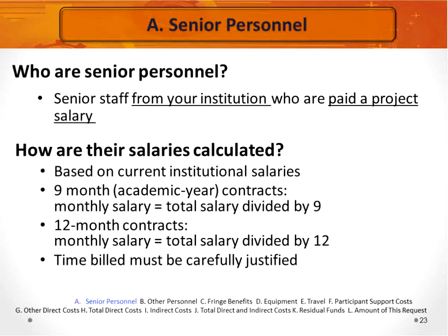Grant work should be contained within a normal workload. There are some very specific short-term exceptions to this NSF rule, and work can be scheduled with compensation during summer months or other times that a faculty member isn't under an academic year contract. But don't plan on being an exception to the no overload pay rule when developing your budget without talking to an NSF program officer first.